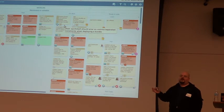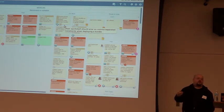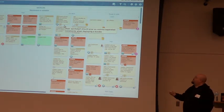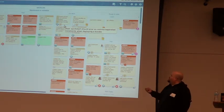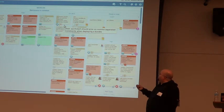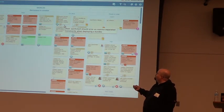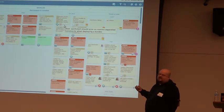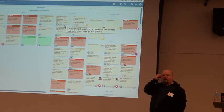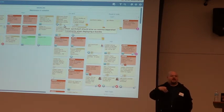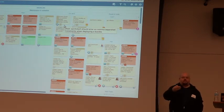So notice when I pull cards from what we should do to what we will do, I'm only prioritizing and dealing with the ones that we scored. These I'm not thinking about. They're not in scope for this two weeks. They're out of my head and it's stuff I don't have to worry about. And it helps cut down on my workload and the team's. So what are the numbers represent? The numbers are our amount of work. So this is two, that's one day. This is four, it's two days. This is two, it's one day. That's the estimate on what we as a team think that card will take to land. Right?